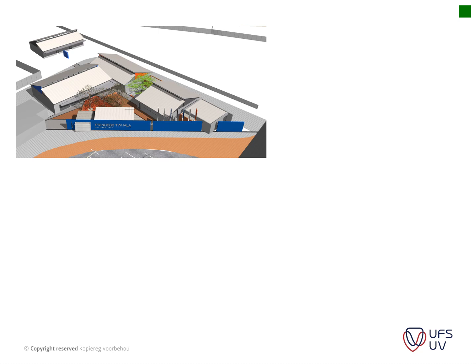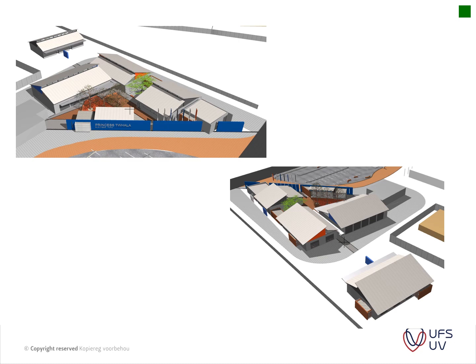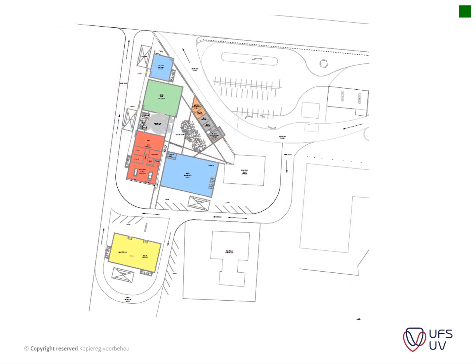This is a project that we had in BlackRock. We got the following type of design, just a concept that was given to the client, so we didn't have a lot of detail. What we could do, we were provided with a basic layout of the project, and we could actually measure all of the different elements, all connecting it to the rate per square meter calculations, and all of those rates were determined for each function.